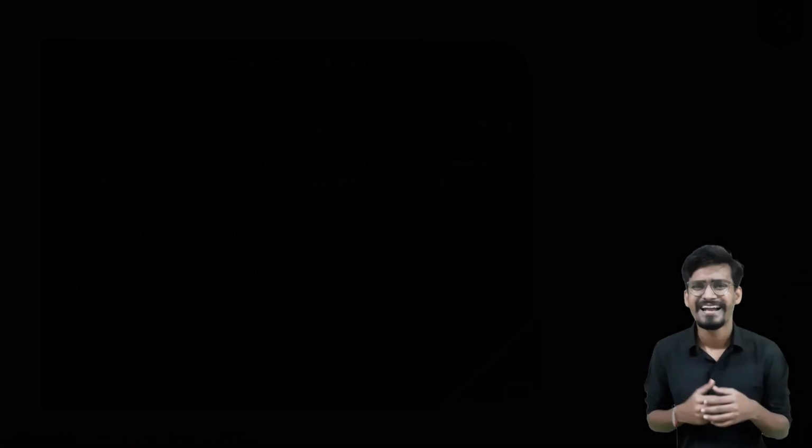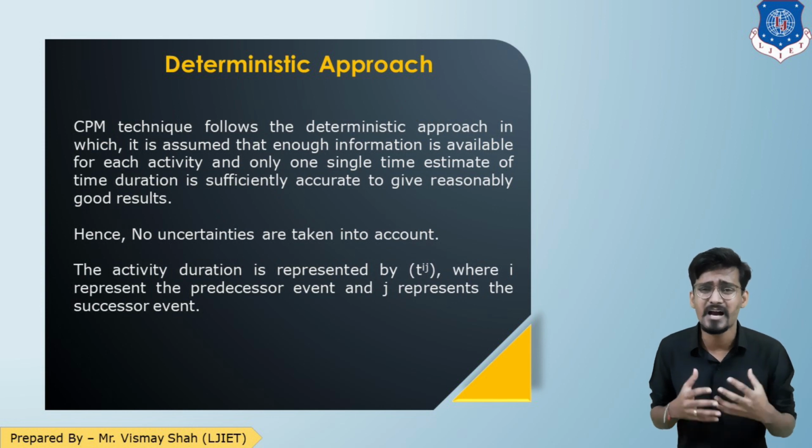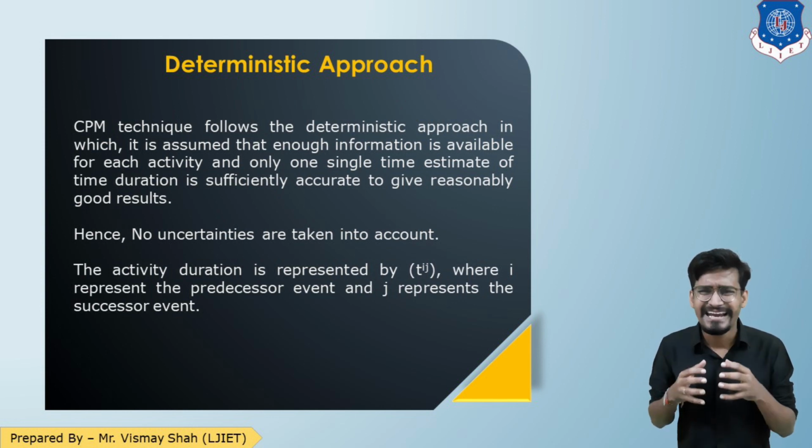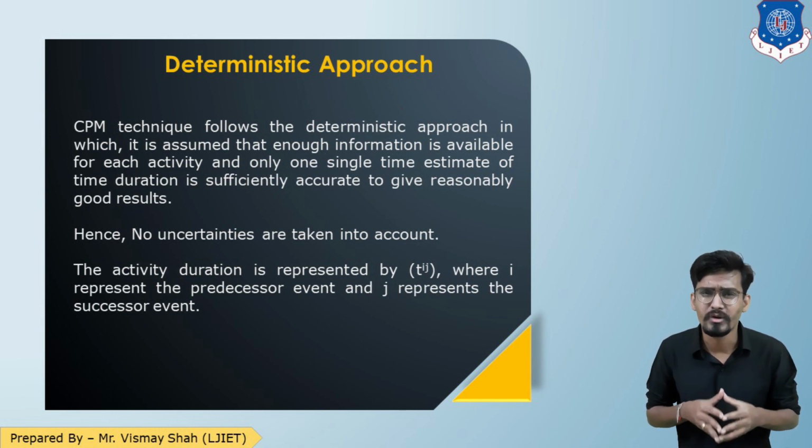Moving forward, now let us talk about the deterministic approach. The deterministic approach means it is assumed that enough information is available for each activity and a single time estimate can be given, that in that time the activity will be completed, and that single duration estimate is sufficient to give reasonably good results.